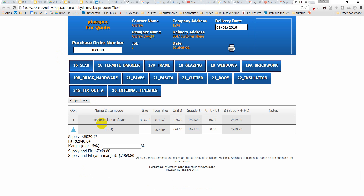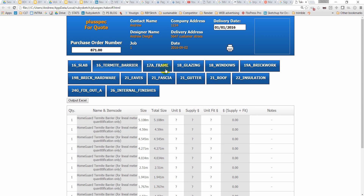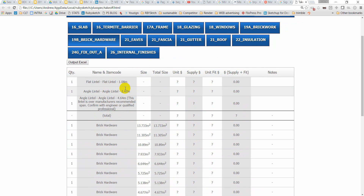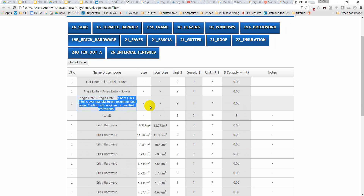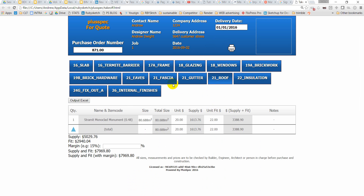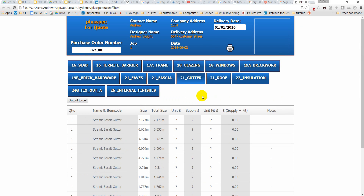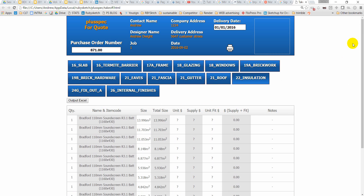Now click takeoff and it does a bill of quantities on everything. It gives me the concrete in cubic meters or cubic yards, my timber framing — every single length of timber, heads over the top of my windows. I've got a lintel at 1.8m, another angled lintel at 2.4m, but I've got one at 4.67m which flags as over manufacturer's recommendation — so get your engineer to check it. Roofing quantities and costs, internal finishes, brick hardware, fascia, gutter, every length of gutter, insulation — everything required.